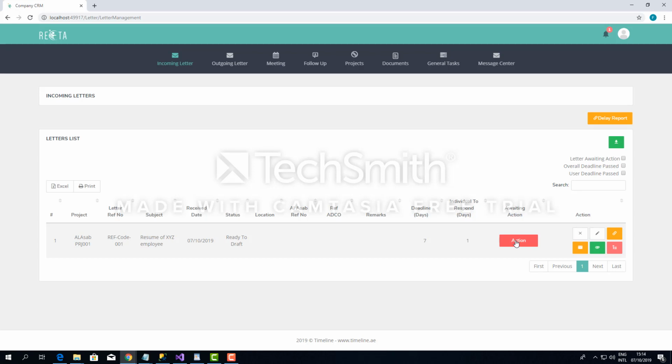They call the owner the COO in the system. Before it goes to the COO, it has to go to the secretary, because normally the owners are busy. So the secretary will verify all the documents, all the request requirements, that everything is okay. The secretary will pass the request to the COO, mainly for the signature. Once the owner physically signs the documents, they will attach them in the system and send them back to the secretary. And then the secretary's duty is to forward the final document to the document controller.